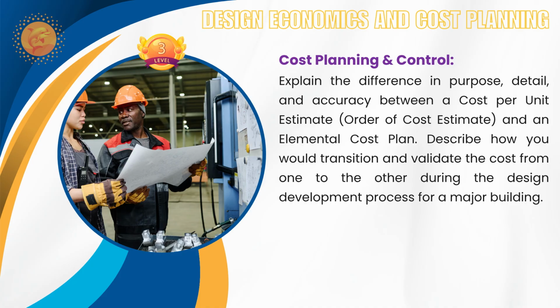So first client's brief will be defined, based on which you will develop a conceptual design that will be helpful to validate breaking down the initial unit rate into elemental targets. These are targets because this cost plan is approximately divided from the unit cost using your benchmark, after which you will control the design developments to be closer within the price range